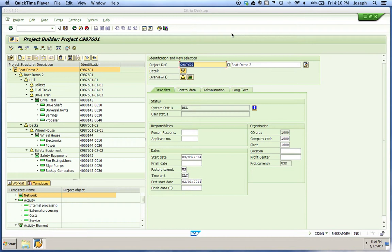There are four sets of dates on all levels of a project — for example, on your WBS elements, your networks, or activities. These can be used in project systems in order to distinguish between planning and execution in a project.